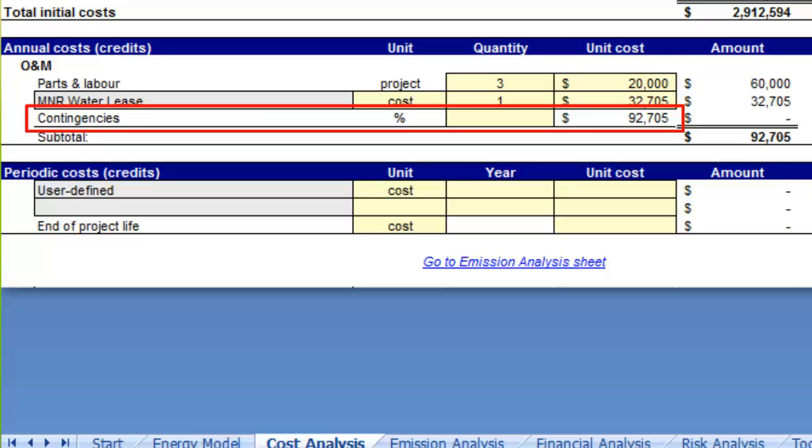An annual contingency allowance should be included to account for unforeseen annual expenses and will depend on the level of accuracy of the operation and maintenance cost estimate section. This is especially true in the case of projects located in isolated areas. It is common to carry a contingency allowance equal to the replacement cost of the most expensive component subject to catastrophic failure. The contingency allowance is calculated based on an estimated percentage of the other operation and maintenance cost. It typically ranges from 10 to 20% of these costs.